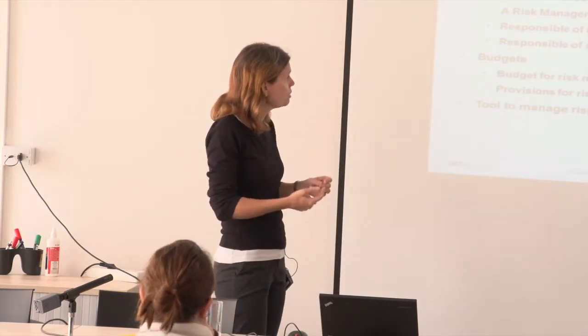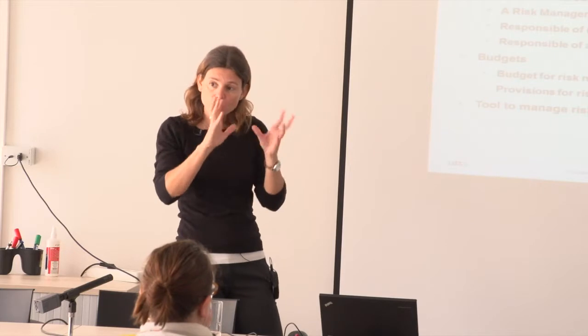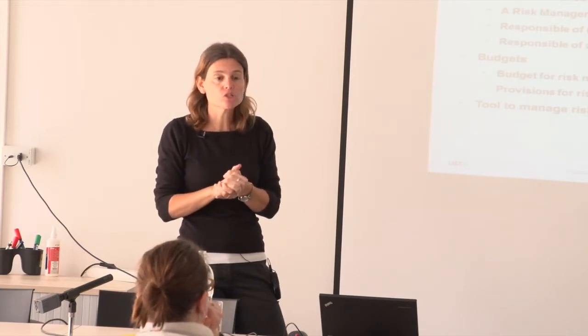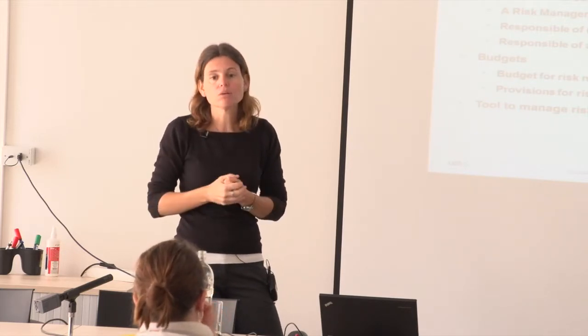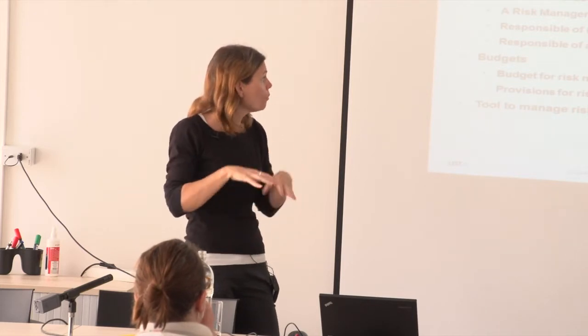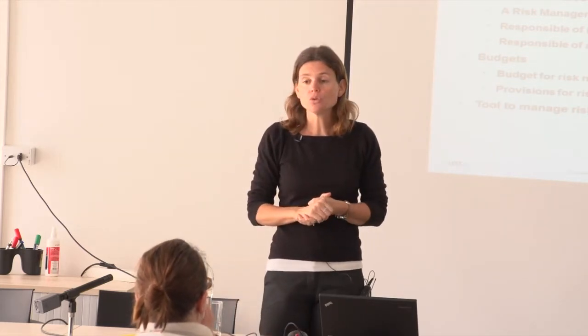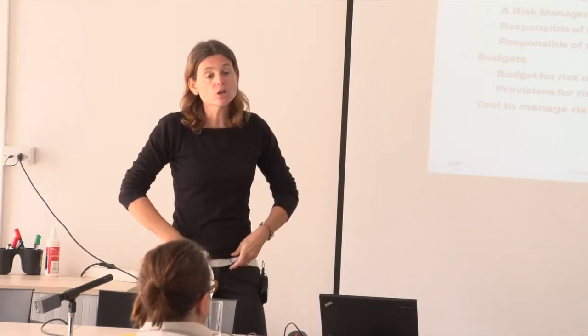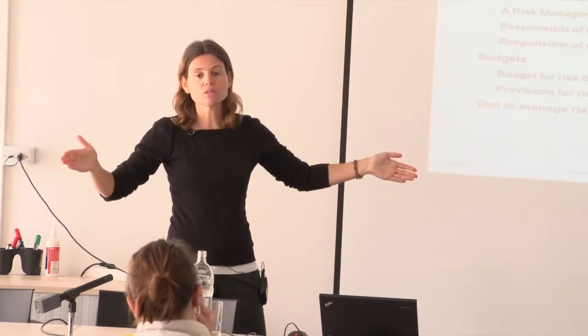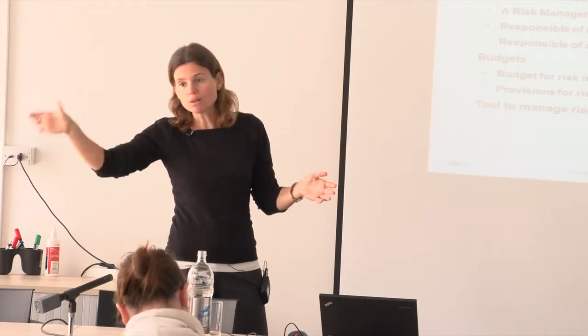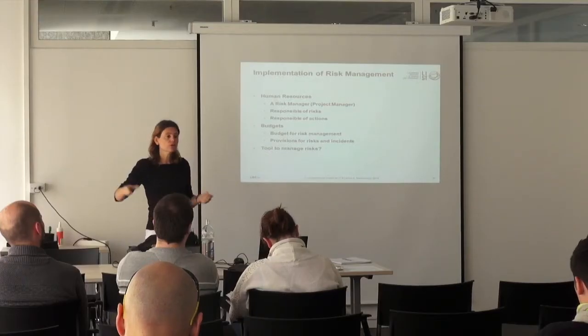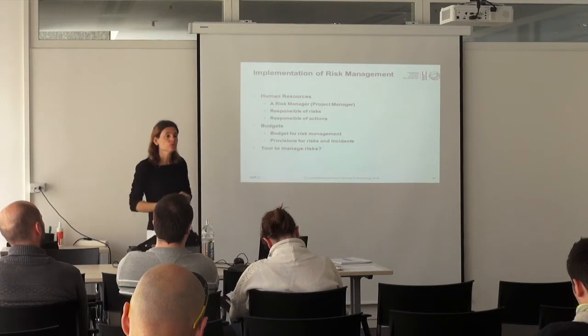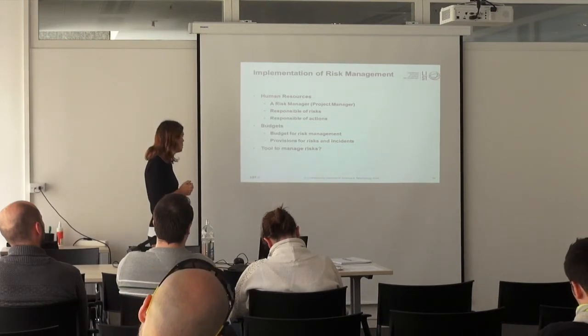And so, as we said, that budget could be an actual action budget with specific lines for each action, or more a provision that you have on your budget. So your budget not being only your estimation and that's it, but that little extra box that will help you take care of your risks and incidents later on.